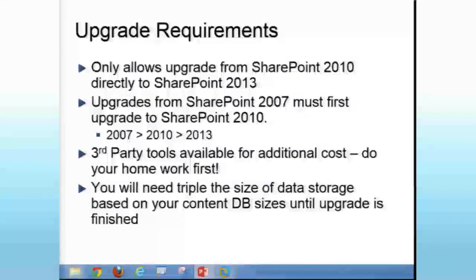So requirements. The first and foremost thing is that if you are in 2007 still, in order to get to 2013, you have to go to 2010. So the path is if you're on 2007, you need to go to 2010. Anybody in 2007 at this point and considering 2010? Yeah. So you need to go to 2010 and then 2013. The good thing is, well, there's nothing good. You have to do the work, to be honest.